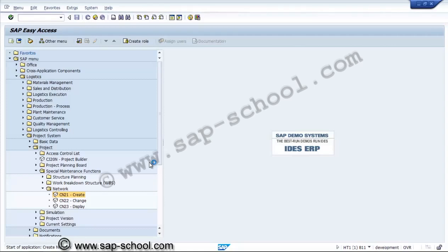So this network numbering we have to keep with relevance to a project. So we need to see any existing project. From the existing project, the profile and network numbering, if we keep similar, it will be helpful for searching a network or assigning the network like that.